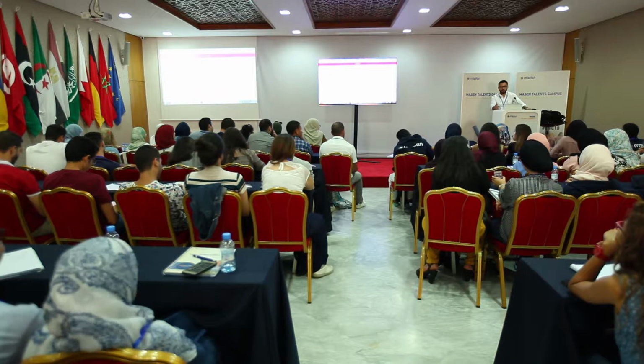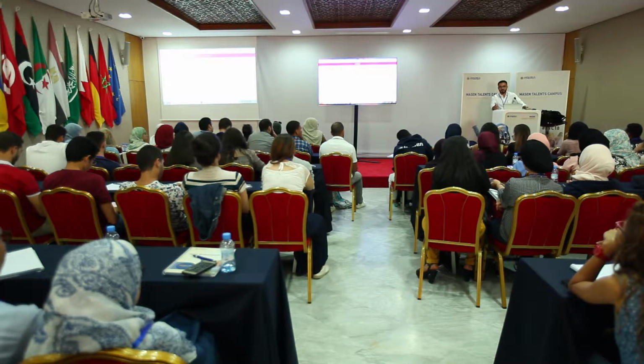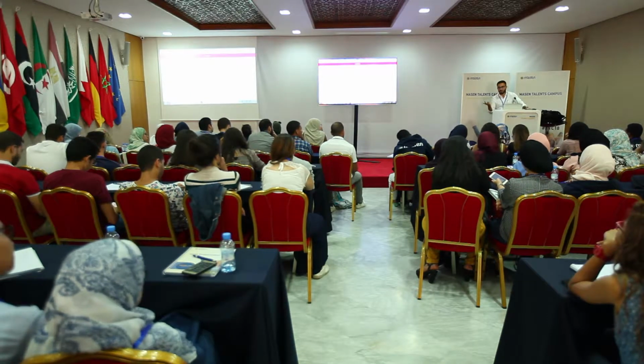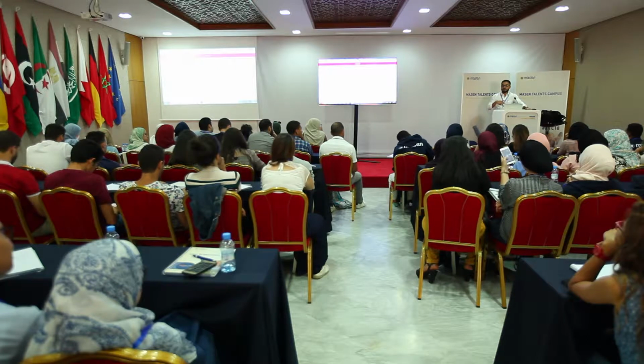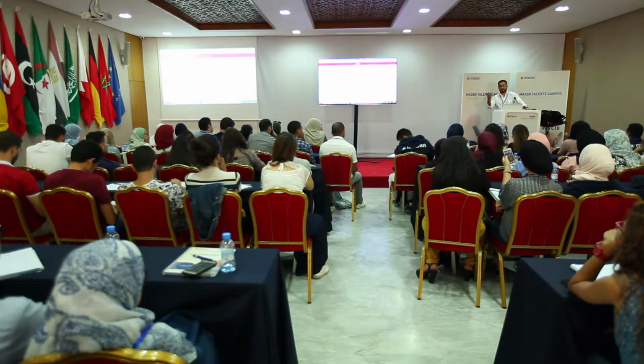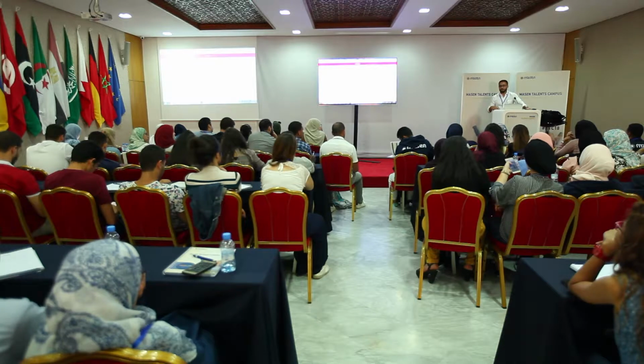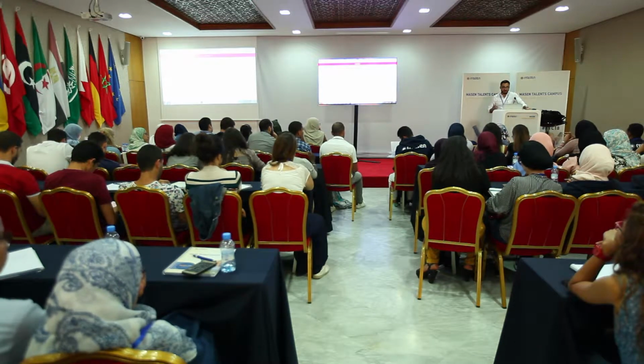And then one bank could say, oh, yes, we put 50 if they buy in. But 50 is not enough. So you need to go to another bank that puts another 50. You need to go to another bank that puts another 100. That process could take a year. And each bank will put their own conditions, their own debt conditions, like this is my interest on the loan, this is my interest on the loan, etc.